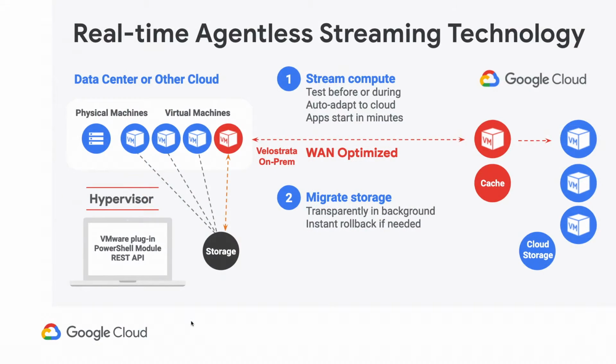Correct. So kind of going back, I'm sure the customer is going to ask, 10 terabytes of my database in 10 minutes, that's not possible. Yeah, exactly. That's not possible. What we're doing is within that hour or two change control window, we look at what the application requests, right? For the hot data, we'll stream that data first, and cache it into that cloud extension within that hour or two window.